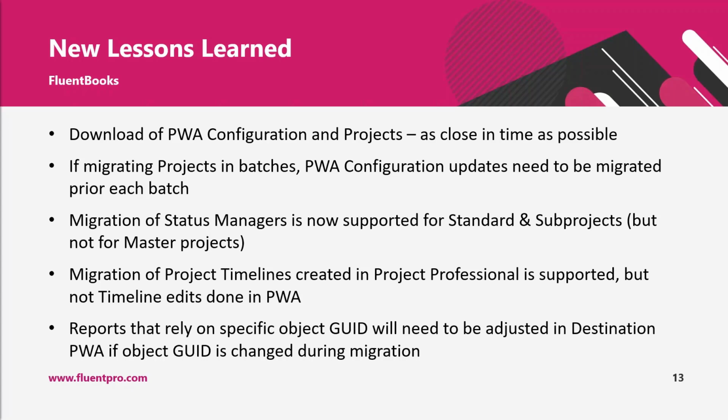And the reason behind that is calendar exceptions that I mentioned before. If there is a gap between download of resources and download of projects, it is possible that calendar exceptions that are stored on the resource level and calendar exceptions that are stored on the project level, they will be different, and this will cause